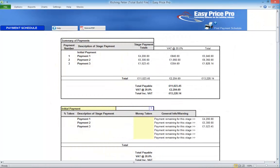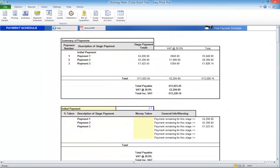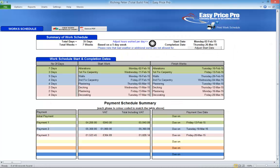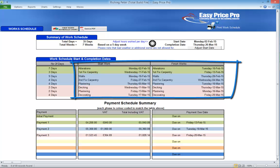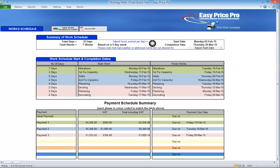Once the payment schedule is set to your preferences, click Reports and go to the work schedule. The work schedule is based on the order the work sections have been allocated to the payment schedule. This is a client-friendly document that you can save as a PDF and send to your client.